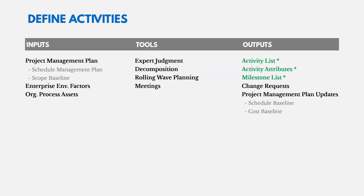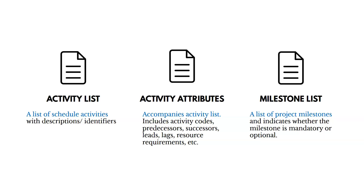The outputs of Define Activities are the activity list, activity attributes, and a milestone list. The activity list is simply a list of scheduled activities. Activity attributes accompany the list and include things like activity codes, predecessors, successors, leads and lags, and so on. The milestone list indicates whether each milestone is mandatory or optional. We could also see change requests and project management plan updates.